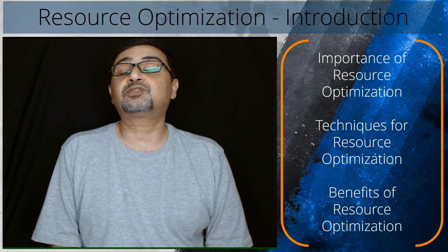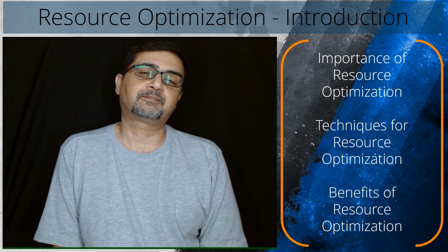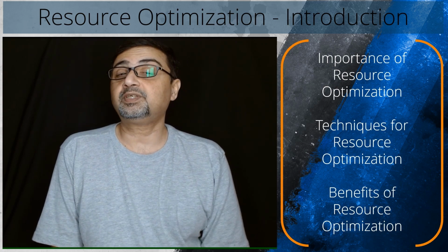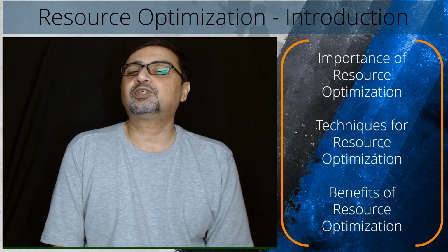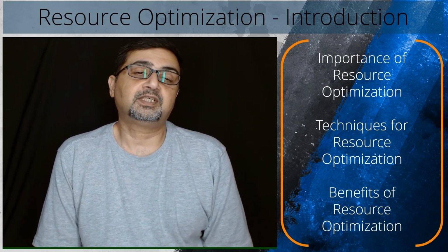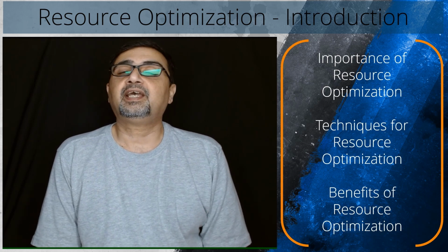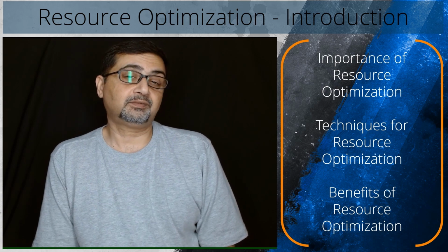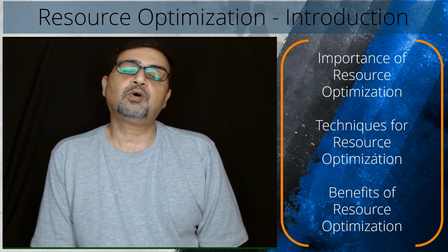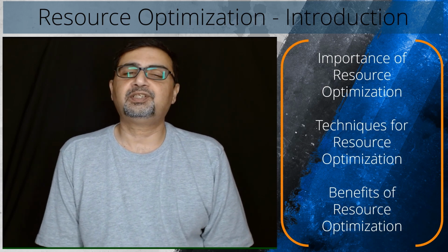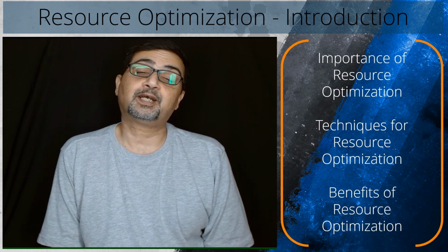For example, imagine a software development project where different teams are working on various modules simultaneously. Each team requires specific resources like developers, testers, and equipment. Initially, the project schedule assigns resources based on availability, resulting in resource peaks and valleys. For instance, one team may have a heavy workload at the beginning of the project, while another team experiences a lighter workload during the same period. To optimize resource allocation and achieve a more balanced utilization, resource smoothing techniques can be applied.